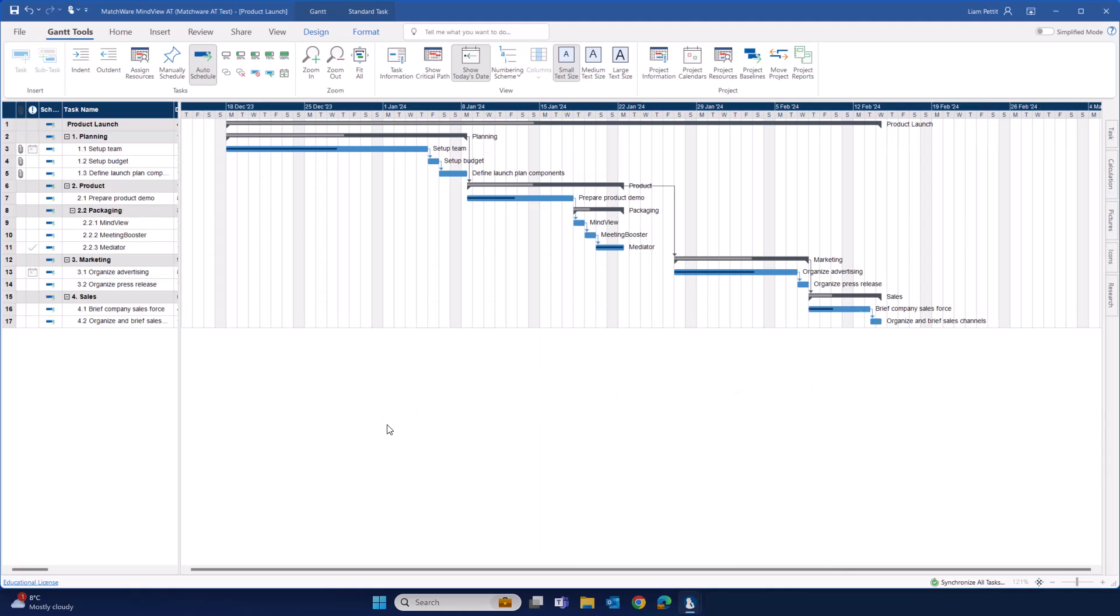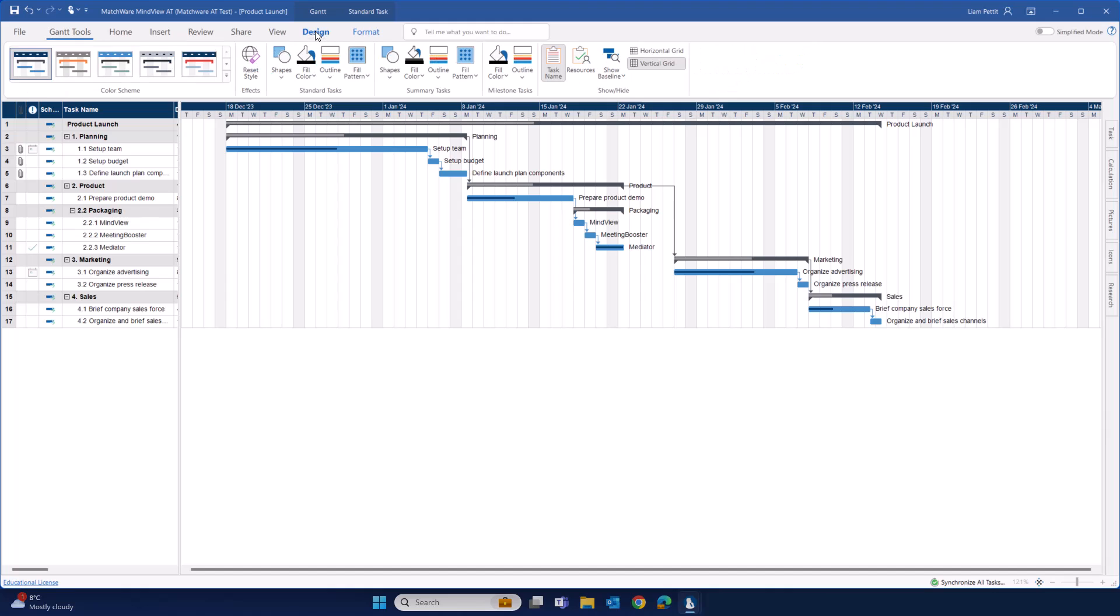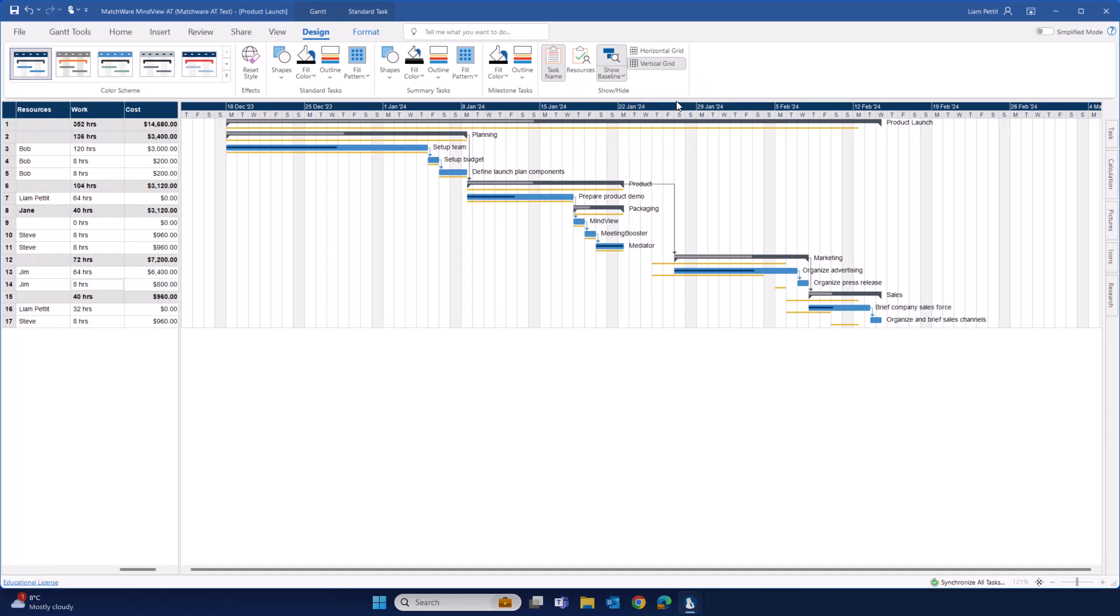Alternatively, we can visualize any schedule deviation by selecting Design and navigating to Show Baseline. Here, you can go between any number of baselines that you've created. Notice within the Gantt schedule, there's a deviation between the current schedule and the previous schedule, here defined by the yellow bar.